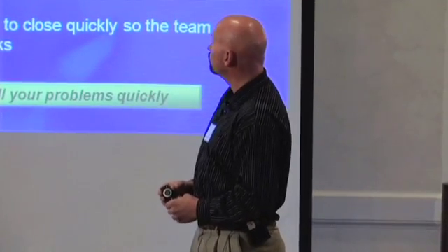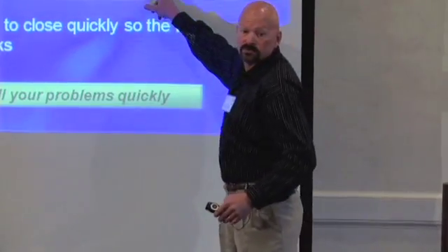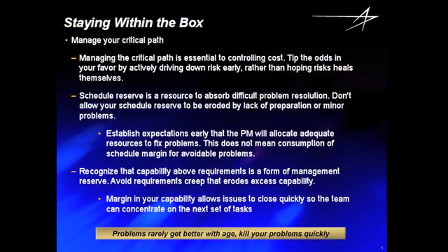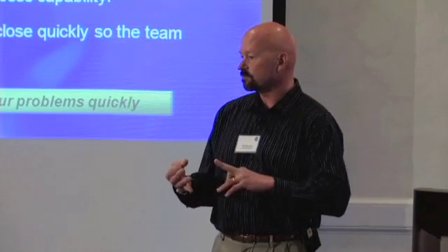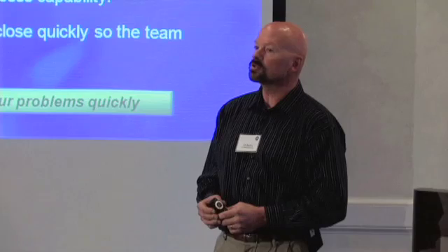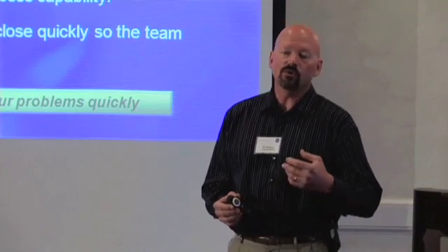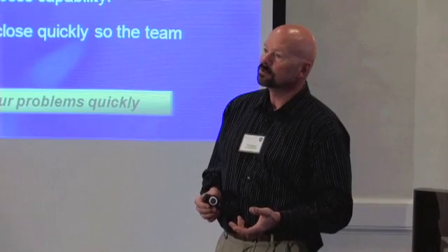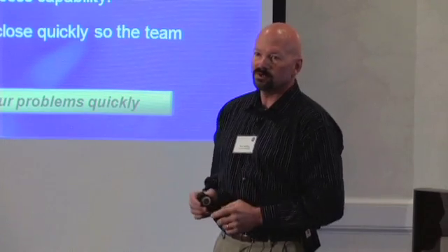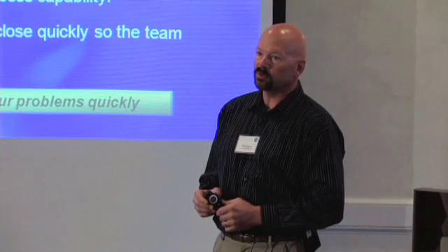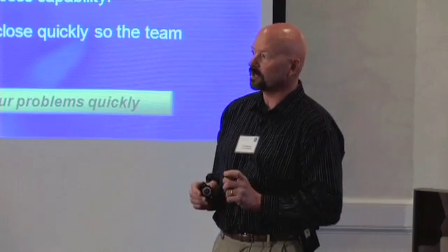This message down here is one of the most important ones that you can lose sight of. You've got a set of requirements you signed up to, you've flowed your requirements down, you've got margin against those requirements. That margin against requirements is another form of management reserve. You've got schedule, you've got mass, you've got power, but you also have excess capability. And if you allow your well-meaning team to give you changes that improve the product, get you more performance, what you're doing is you're eroding your reserve in the form of that excess capability.